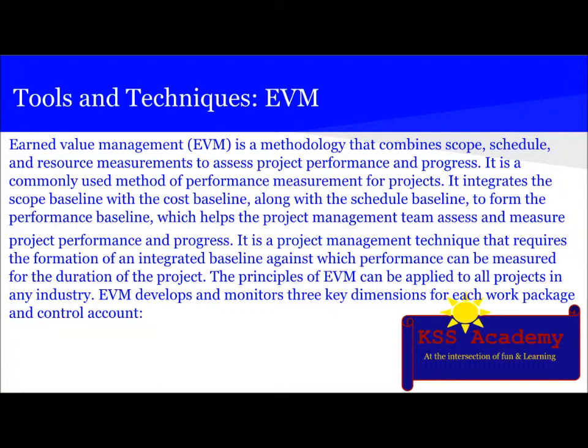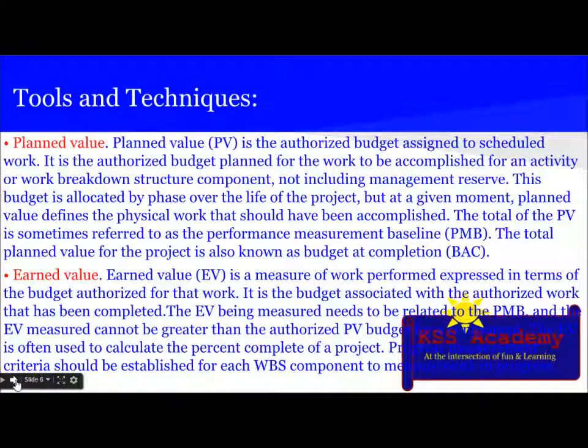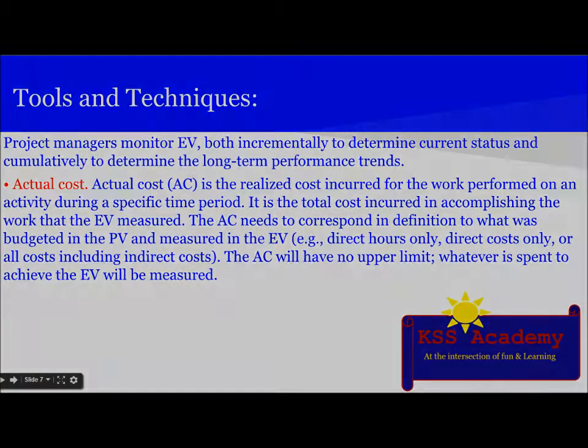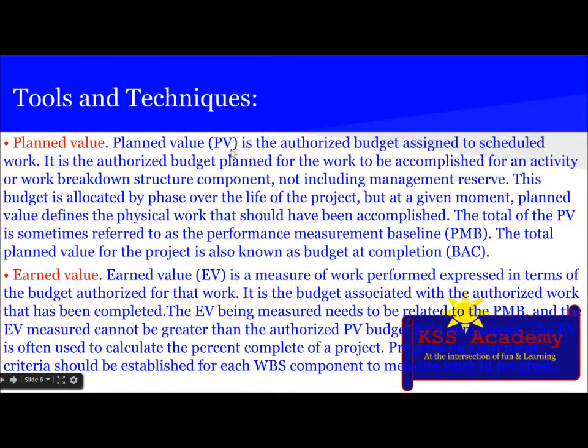It is a project management technique that requires the formation of an integrated baseline against which performance can be measured for the duration of the project. The principle of EVM can be applied to all projects in any industry. EVM monitors three key dimensions for each work package and control account, and those are planned value, earned value, and actual cost.